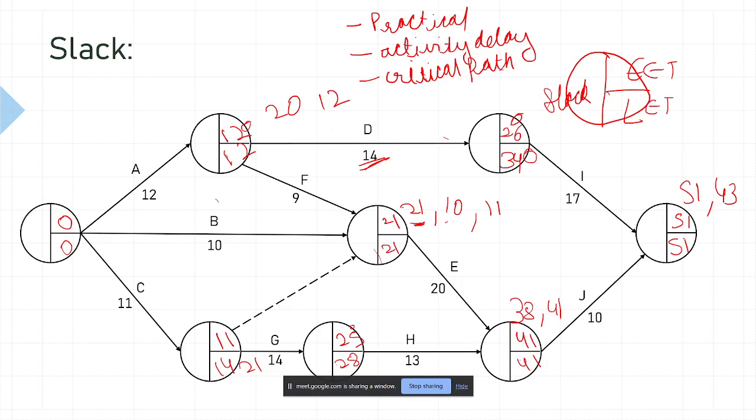So if we increase the number of dumpers according to the productivity of the excavators, they may be more utilized and more cost effective in a practical way. The idle time of the excavator will be less.